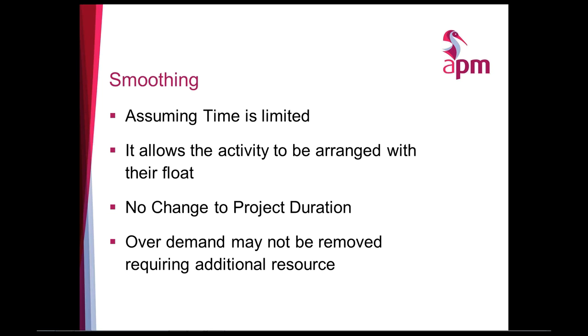So if it's 20 days, it's still 20 days at the end of the smoothing exercise. The disadvantage is not all of the issues can be resolved, so you still might end up with peaks in your resource. However, it will be a lot smoother than the original resource profile.